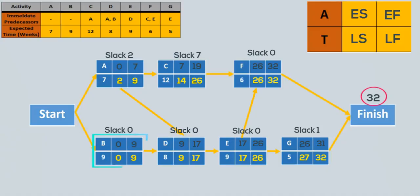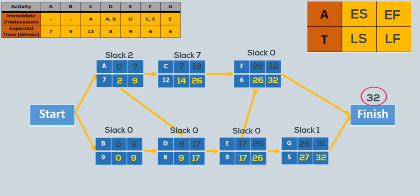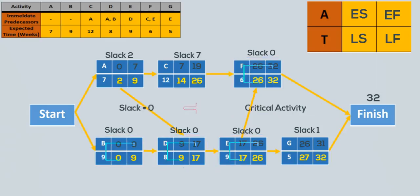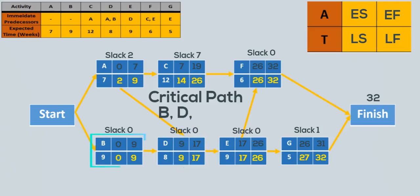Activities B, D, E, and F, on the other hand, cannot be delayed at all without extending the project's completion time. So for example, if D is delayed by 2 weeks, then the project completion time will be extended by 2 weeks as well, from 32 to 34 weeks. The activities with zero slack are called the critical activities and they form the critical path, which is the longest path in the network. So the critical path here is B, D, E, and F respectively.